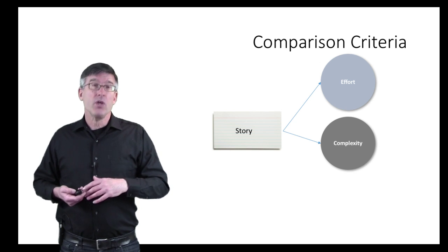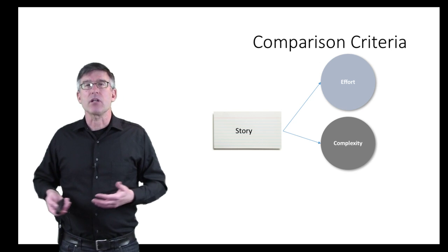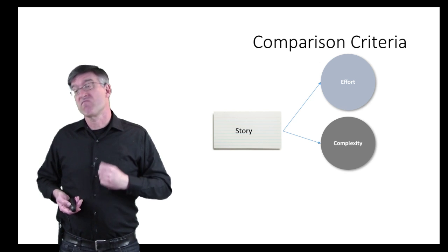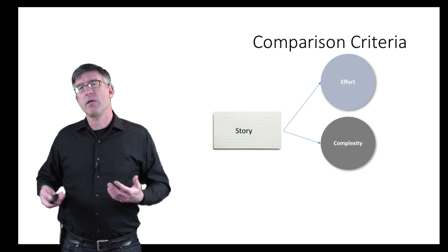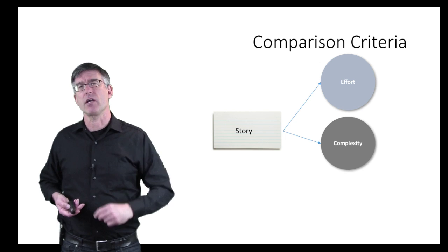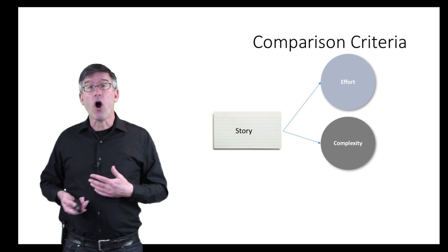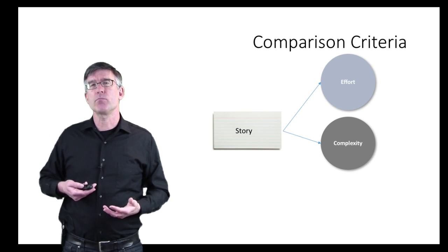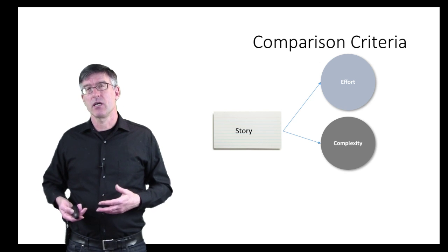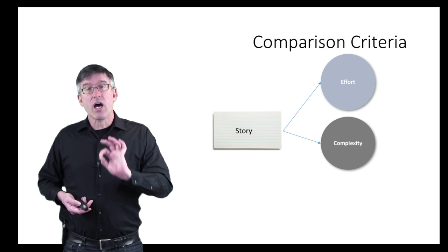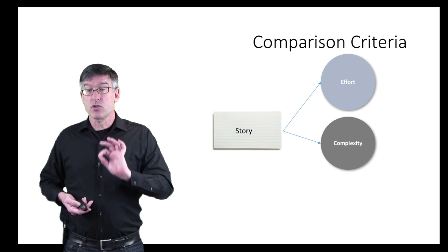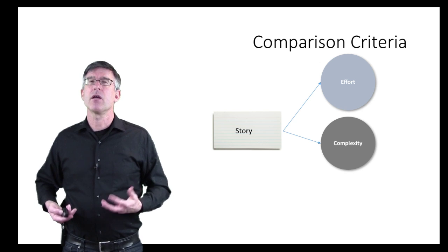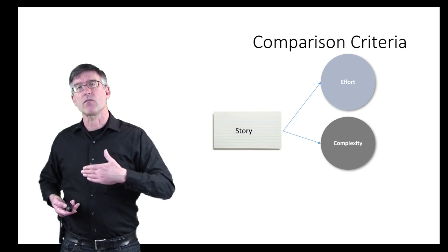For example, you may be writing a software module or an object or a class, and it might just be a lot of code. There may be 100, 1,000 lines of code in it, but it may be pretty simple and straightforward. There's just line after line after line. On the other hand, it could be a fairly complex algorithm that you're implementing. And that means there's a lot of branching, there's a lot of loops. It has very, very high cyclomatic complexity. So that definitely drives the size of the story. If it's got a lot of complexity, a lot of decisions that have to be made in it, it's certainly going to be bigger than one where there's just simply a lot of lines of code or a lot of things to be built.